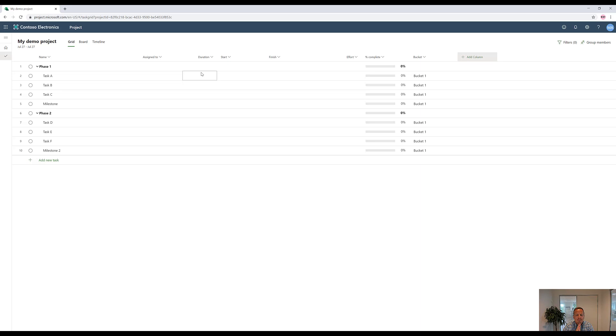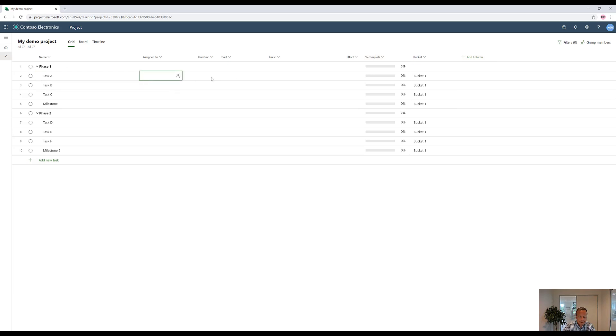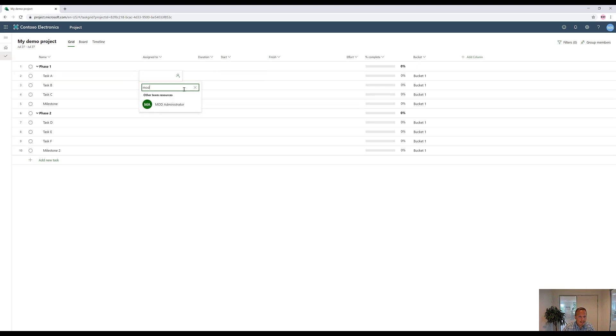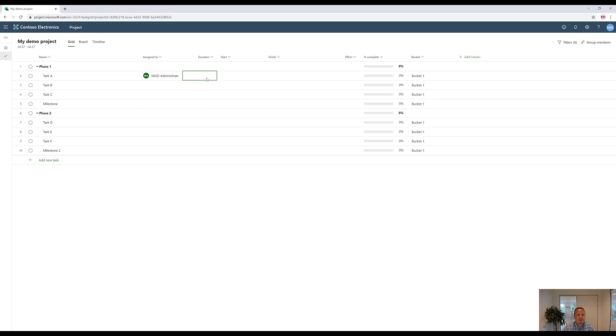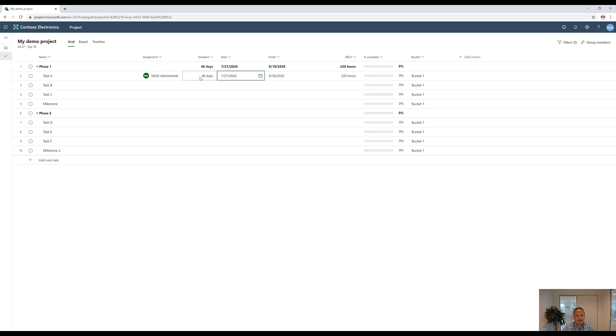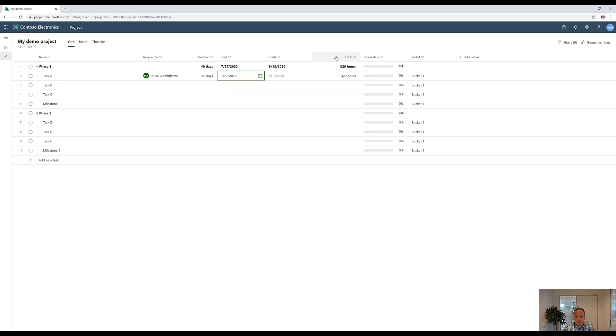A scenario could be that on the task A level, we want to go in and add a person, which could be the administrator person. Then we want to set aside X amount of time in terms of duration, saying this specific task will take 40 days to execute. It will then suggest that the starting date for this task is the same time when the project starts, July 27th, so next Monday. And it also suggests effort, which is in this case 320 hours.